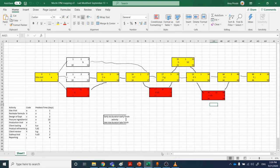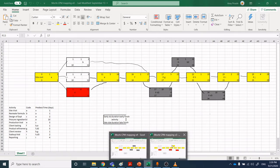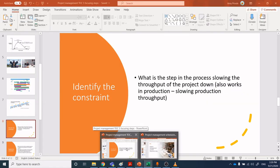We changed the project duration — it's 29 days here. So we subordinated by ordering everything anticipated in advance, rather than ordering three times. We went from 50 days originally projected down to 29 days, shaving 21 days off the duration of the project. If you are paying salary whether people are working or not, you just saved a lot of money — 21 labor days on this project.